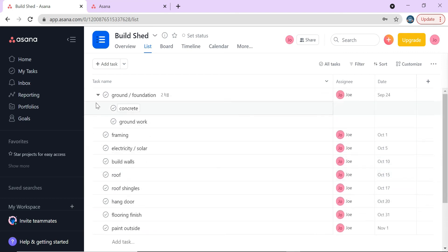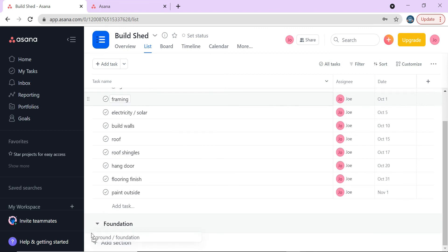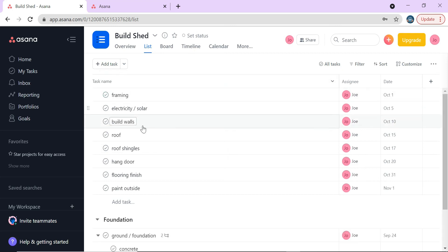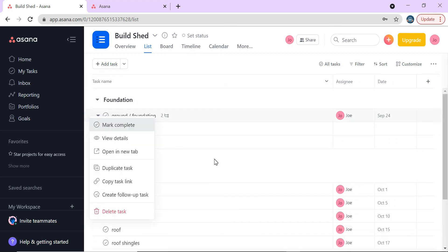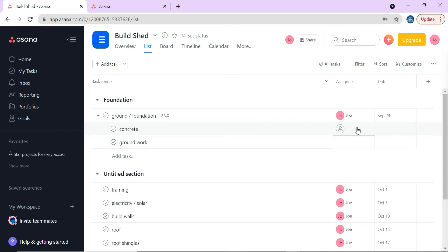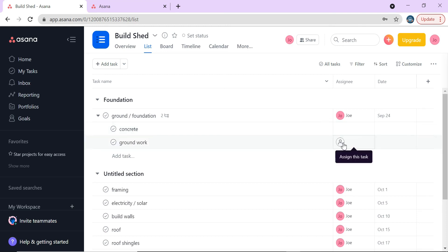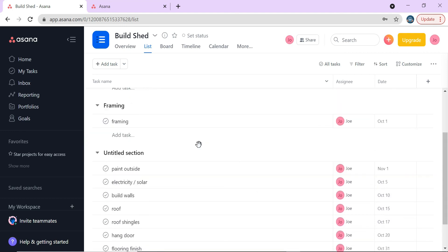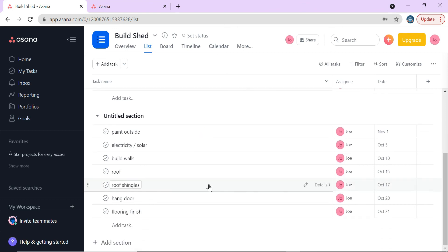I'll add a section called 'Foundation' and move tasks under it. The free version doesn't have milestones, but this is how you organize your project into sections. You can see that the concrete needs to be purchased and groundwork done before the concrete is poured. This is how you set up personal projects, which works the same way for all your professional projects too.